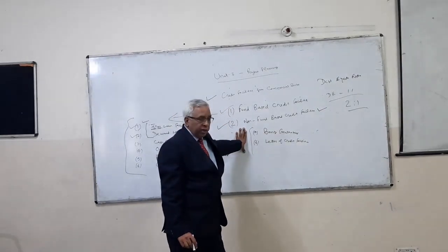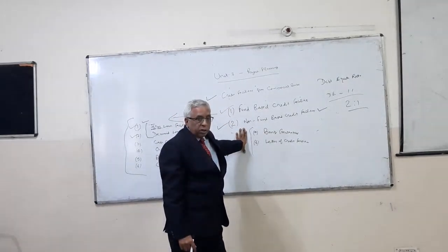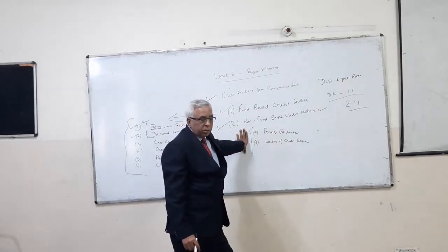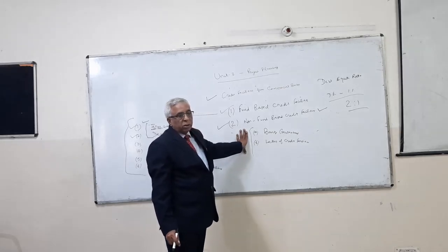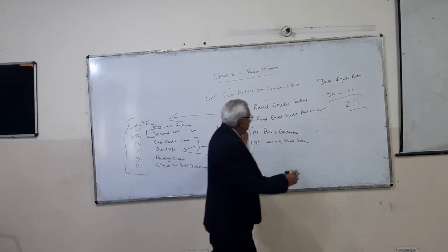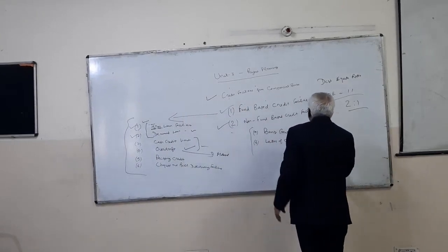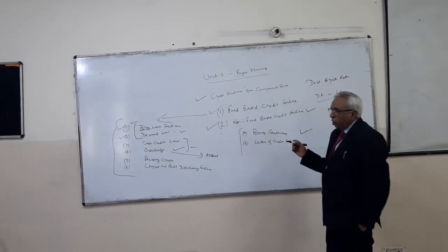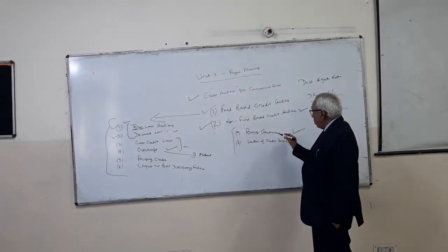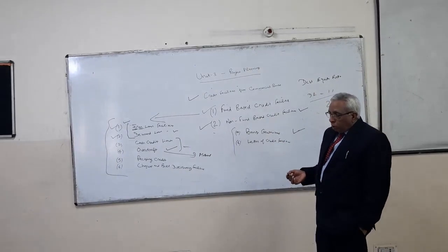Especially in project financing, the authorities in this business give you some orders to execute the project, and they need a bank guarantee. It means they want to verify that whatever you are claiming, you will definitely complete it within time.